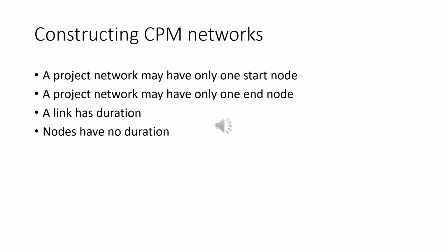Next rule is nodes have no duration. Nodes are events. They are instantaneous points in time. The source node is an event.